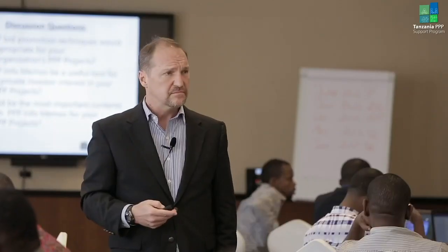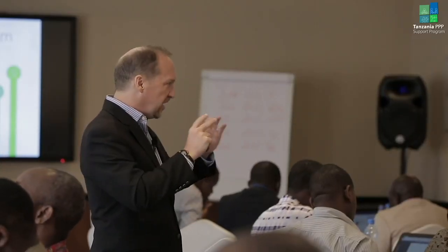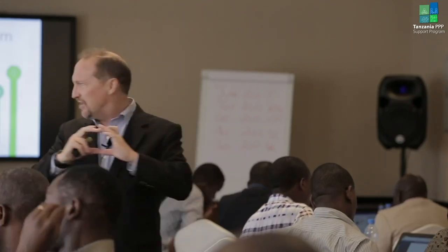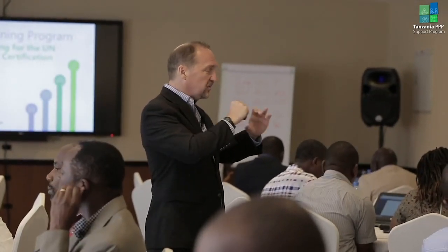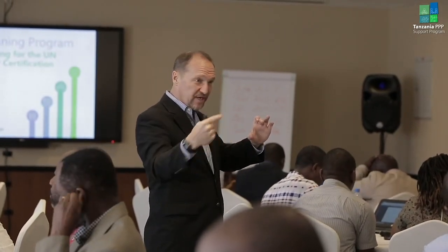Let me at least say one thing, which is that there's a reason we'll oftentimes call PPP projects single-purpose project companies. When we create the project company or that SPV, we sometimes refer to it as the single-purpose project company. When investors invest in it, when lenders lend to it, when the government awards a contract to it, it is for that one project and that one purpose.